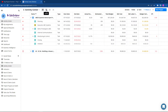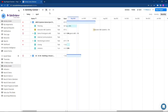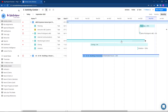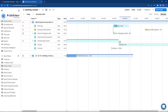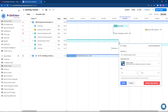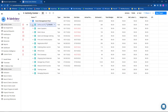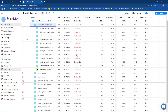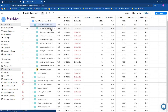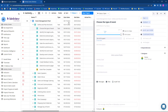The Gantt chart offers a clear indication of projected timelines and the option to set up dependencies between tasks or related projects. Click the dependency arrow to set lag days or customize the dependency. With the task timeline in place, you will have a clear visual of your project timeline. Your project will always get its date range from the task dates listed below, starting with the earliest start date and ending at the furthest end date.